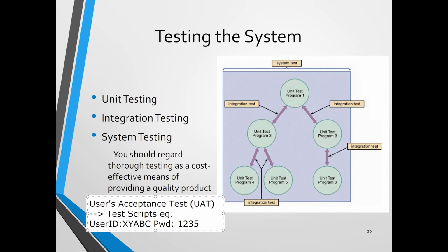So who can prepare the user acceptance test? I told you earlier that system analysts normally prepare the test script, but the ones who know the flow of the system more than system analysts are the key users. As a system analyst, together with the key users, you might have to help each other to prepare the test script for the UAT.